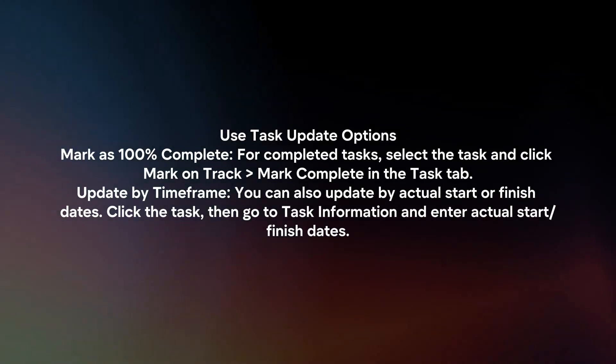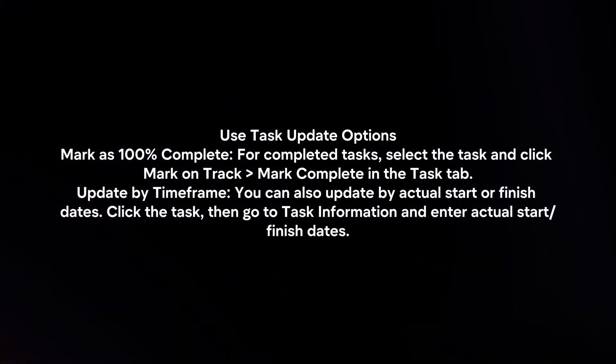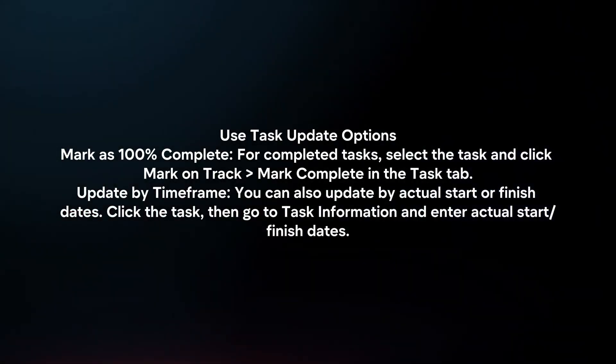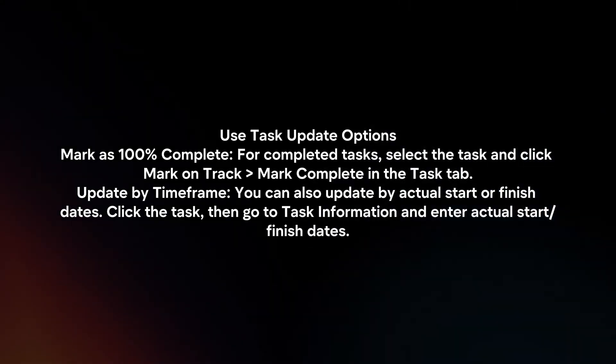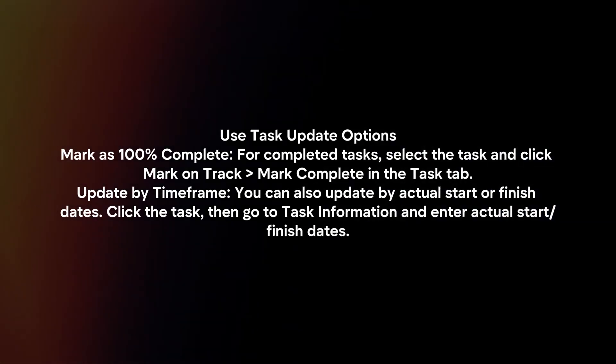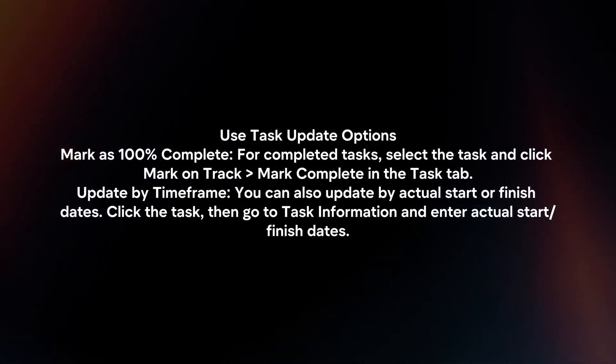Update by time frame. You can also update by actual start or finish dates. Click the task, then go to task information and enter actual start or finish dates.